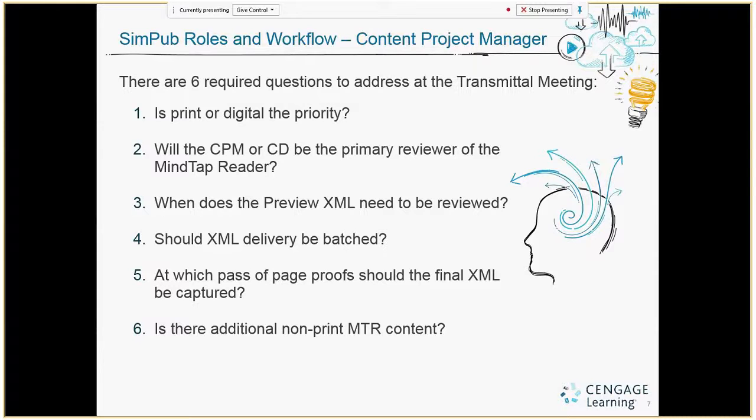What this question is getting at is we recognize that the same team is working on finalizing the product, and at some point, that team can only finalize one set of files. They can work and focus on finalizing print, or they can work and focus on finalizing digital. Once they finalize one, they then turn their attention to the other, okay? So with that in mind, we want to ask this question: is it print first, or is it digital first? And then we have gained a little more time for one or the other.